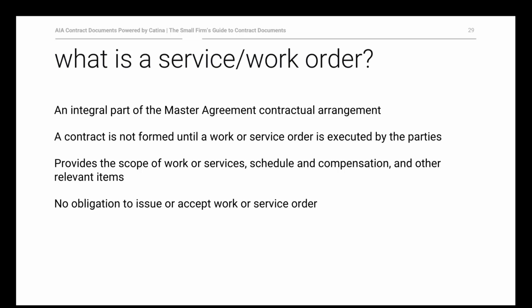And so you need the service order or work order to bind with the terms of the master agreement. And when you complete the terms of the service order in conjunction with a master agreement, that's when you have a binding agreement for the scope of services outlined in that service order. And again, with each slide, you can see we talk a little bit more about what's in the work order.